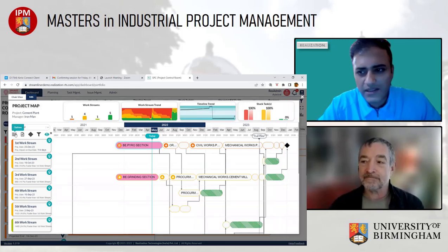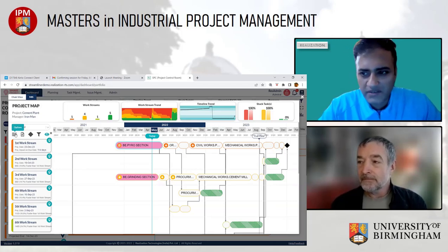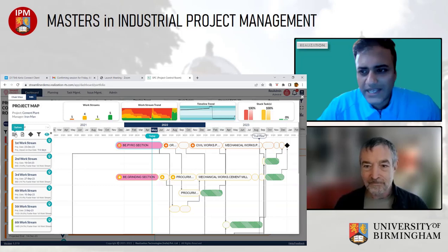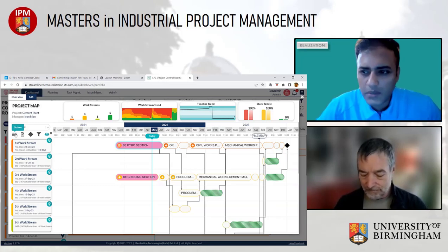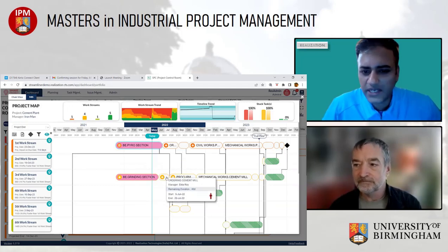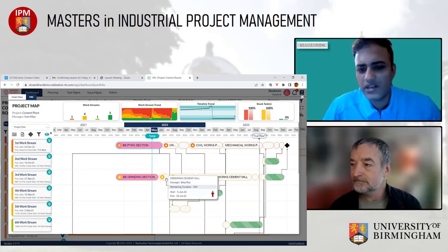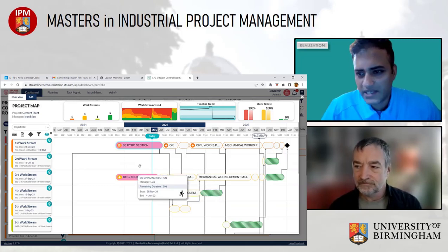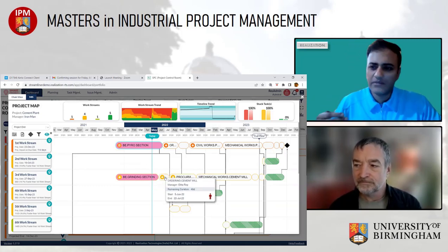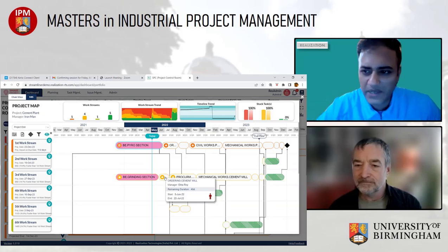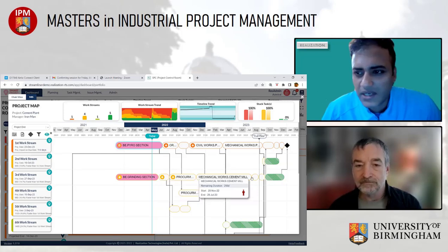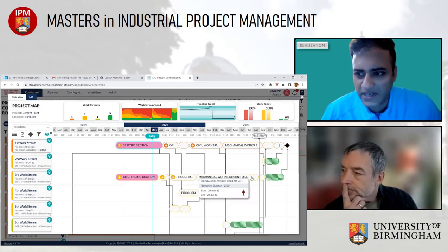So as you said, there are 3 layers to my problem solving. So one is when I sit in the beginning of the project, things that I can see, I know about. So they are captured in tasks. So that is how the batches are created. So as you can see, the ordering of the cement mill is after the basic engineering of the grinding section. I can predict right from the beginning that it is going to happen after I complete the basic engineering. So that is mapped in the logic of my batch network.